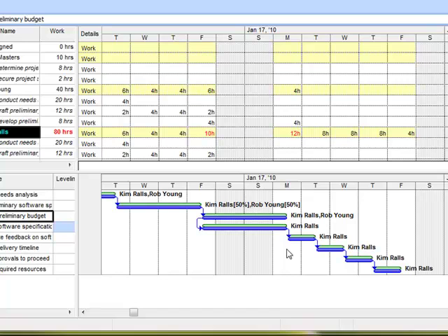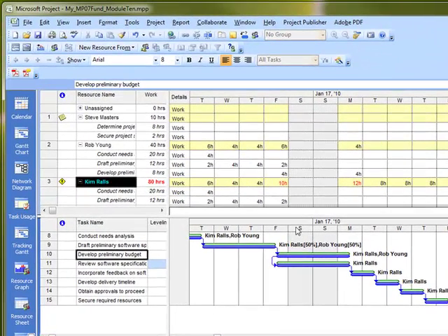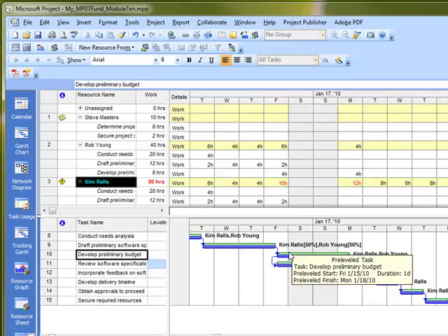Now on the next couple pages in your PDF, you'll notice that there's a section on manually resolving overallocations, and there's a list of project management techniques that one can use in order to resolve overallocations if the level resources command doesn't do exactly what you need it to do. So a couple things is increasing the maximum unit available.